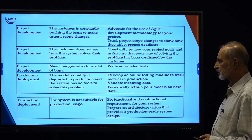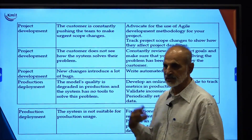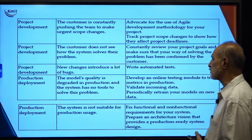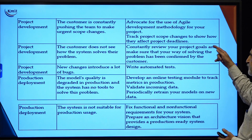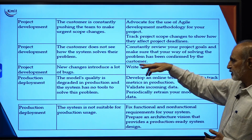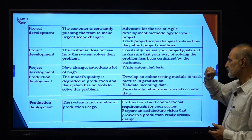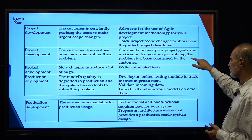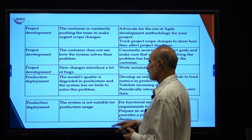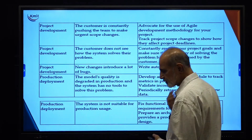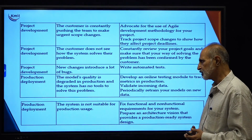Under project development, the customer is constantly pushing the team to make urgent scope changes — the solution is to advocate for agile development methodology and track project scope changes to show how they affect the deadline. If the customer does not see how the system solves the problem, constantly review your project goals and make sure your way of solving the problem has been confirmed by the customer. When new changes are introduced and cause bugs, you must have the right automated test cases in order to address those bug issues.